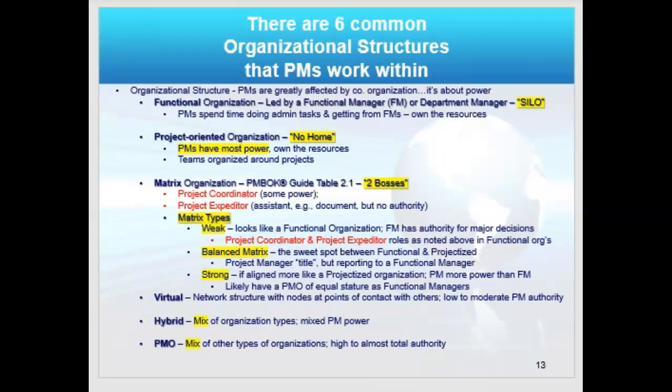Are you in a functional organization, which is led by a functional manager, sometimes called a department manager? This is like a straight up and down silo. You might have engineers in one function, project managers in another function, accountants in a third function. They're functionally aligned, and you have to work up the chain, and decisions are made by functional managers. You could work in a projectized organization. Express Scripts sometimes is a common projectized place. The nickname for a functional organization is a silo, straight up and down, like a farm silo.